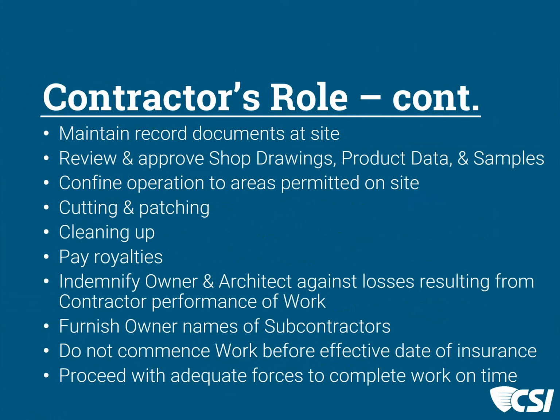You've got to go sign contracts with some 300 subcontractors or 50 subcontractors. That's going to take a minute. You've got to get some documents back in your hands to get to us. That's going to take some time. Steel drawings are not something that can be done overnight. We understand you need some time to do that.